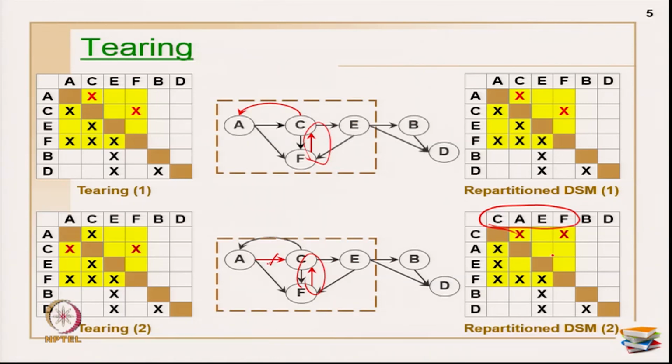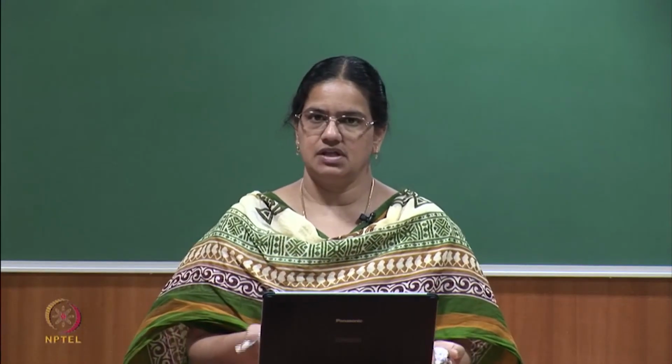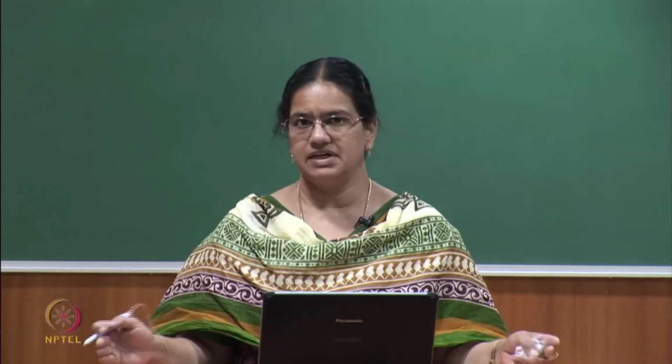Now, I am just wrapping up from the start till the end in the formation of DSM. In formation of DSM, you had 2 steps: WBS in order to get the list of entities, for example, the list of activities, and you used multiplication of 2 DMMs in order to get an activity DSM just to get the X marks. Still you have to verify with the experts and refine your process, and then you go into partitioning. In partitioning, it identifies all your sequential and independent activities, which implies the dependent and independent activities, and all your blocks are identified. Okay.